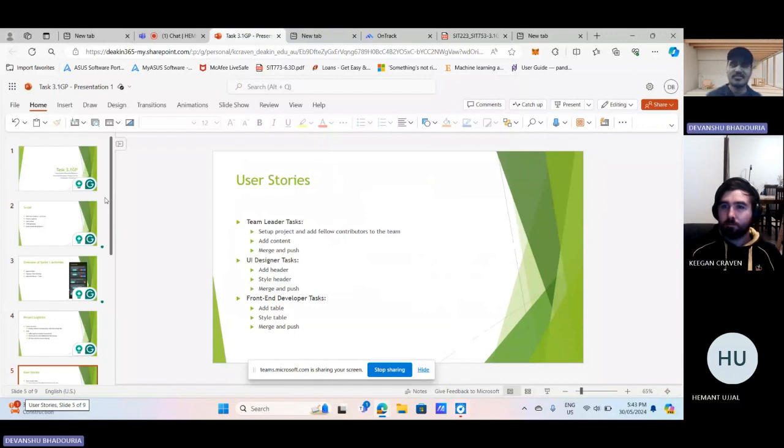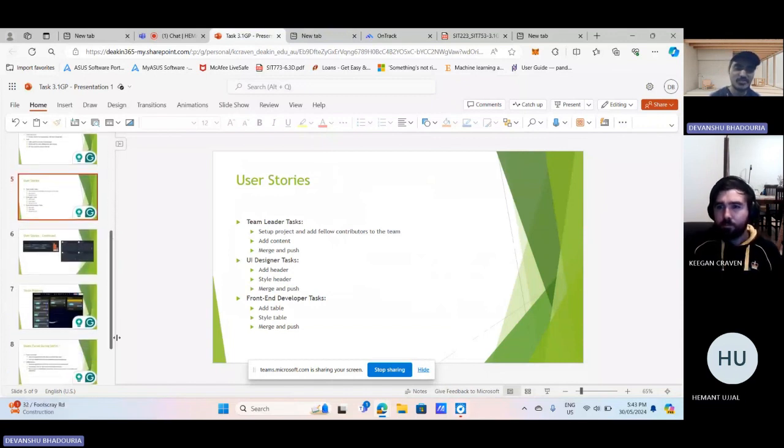Yeah, I think in the front end task, you need to add the tables and the content. So you will be changing HTML files and CSS files. So 3 points are enough for that. The tasks are fairly straightforward. It is not very lengthy or difficult.